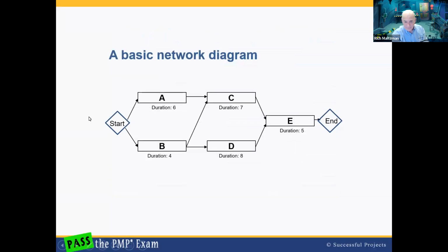So let's move ahead into our network diagram. We've taken the information from that table and created a network using arrows, and arrows are key. Arrows to communicate visually those dependencies based on the predecessors. And if you remember, C cannot start until A and B are done. That's represented by these two arrows. Task C cannot start until both A and B are finished. That's called a merge. That particular configuration is called a merge because several arrows come in together.